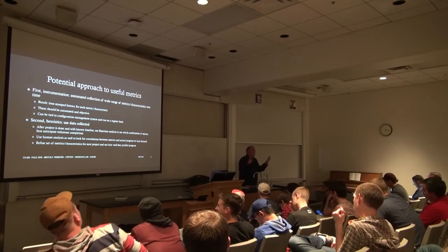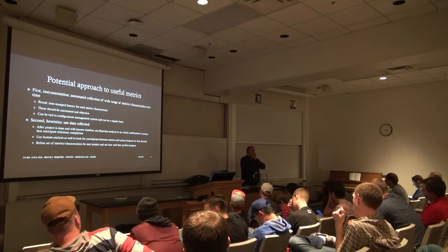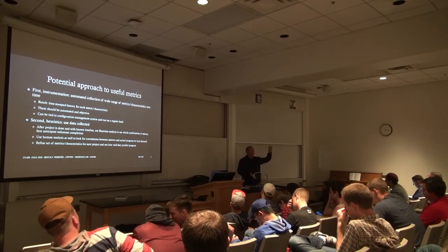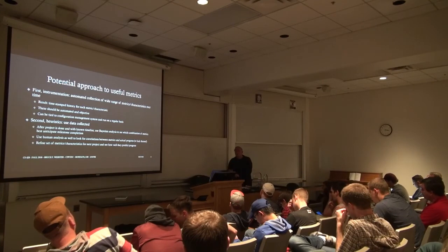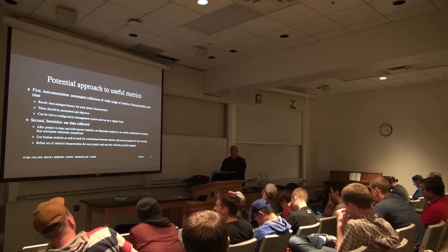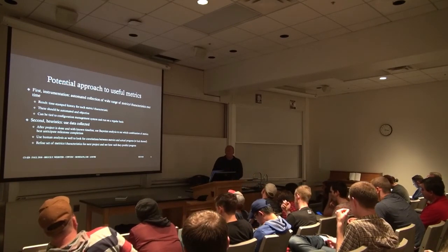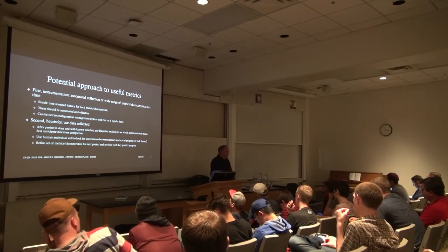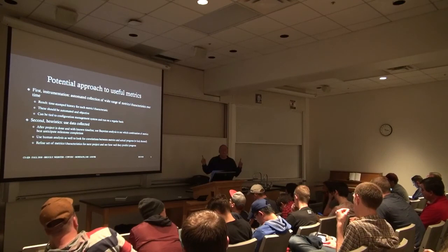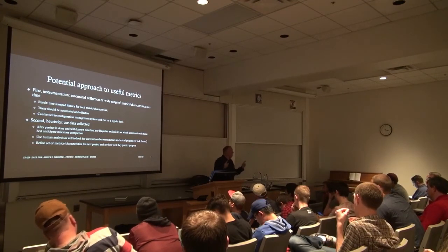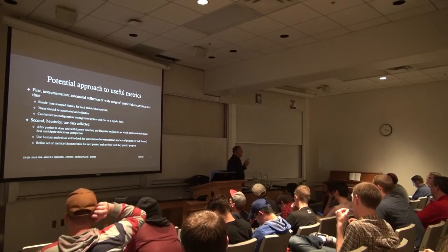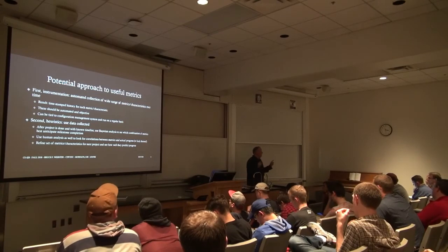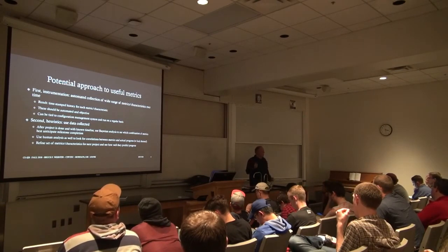But basically, what you do is, oh, I found a bug. So what you do is you describe, here's a defect, here's what it did, here's how you can reproduce it. Then someone has to assign both the severity and the priority, which are not necessarily the same. Severity is, what's the impact? Well, the whole program crashes. Okay, that's pretty severe. Or it's like, well, there's a miscolored pixel up in the corner. Okay, that's not terribly severe.